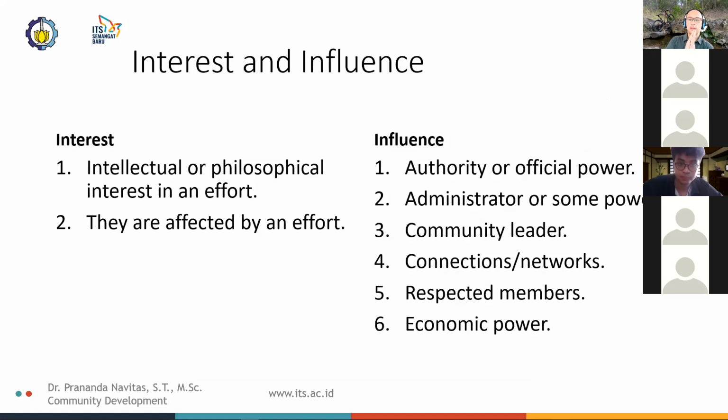Now, when we talk about interest here, it means one or both of two things. First is that the individual or the organization or group is interested intellectually or philosophically in the effort, and or two, they are affected by the effort.